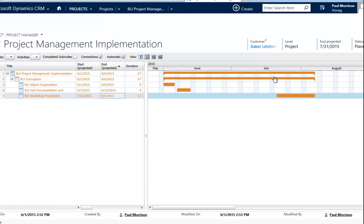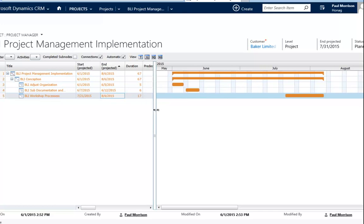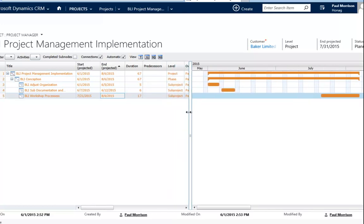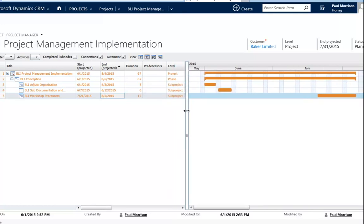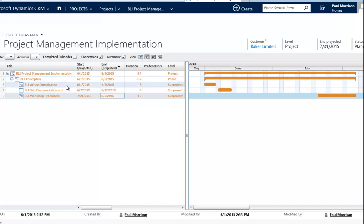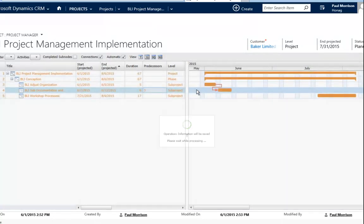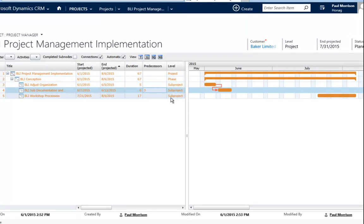I also have the possibility to set up relationships. To set up relationships, there's again two possibilities. The first possibility is to set predecessors. I can for example say the documentation can only be done after the adjusting of the organization. So what I will do is I say organization is the predecessor of documentation. I double click into predecessor, you see the nodes I can connect to. I say I want to connect to row 3, select that, and the relationship is done. This is the first possibility.